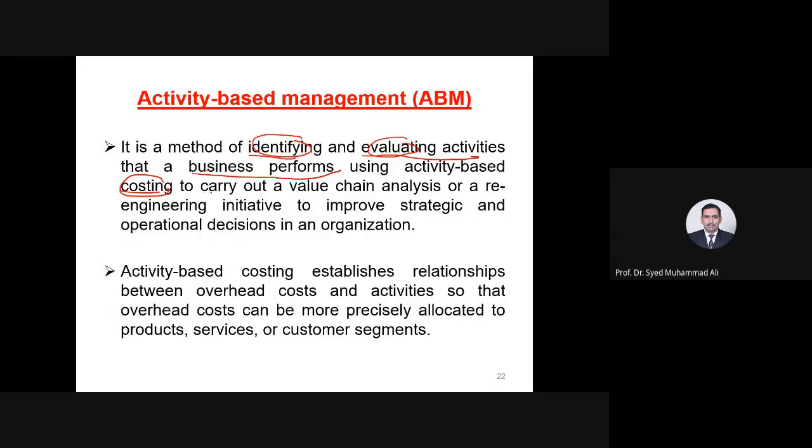The most costly job in the entire surveying process was the contouring, for example, or when the total station was being deployed and moved along a certain traverse, that is the most expensive. So now Hassan knows the most expensive activity or task, whatever you call it, is the physical use of the total station when you are moving on a traverse.